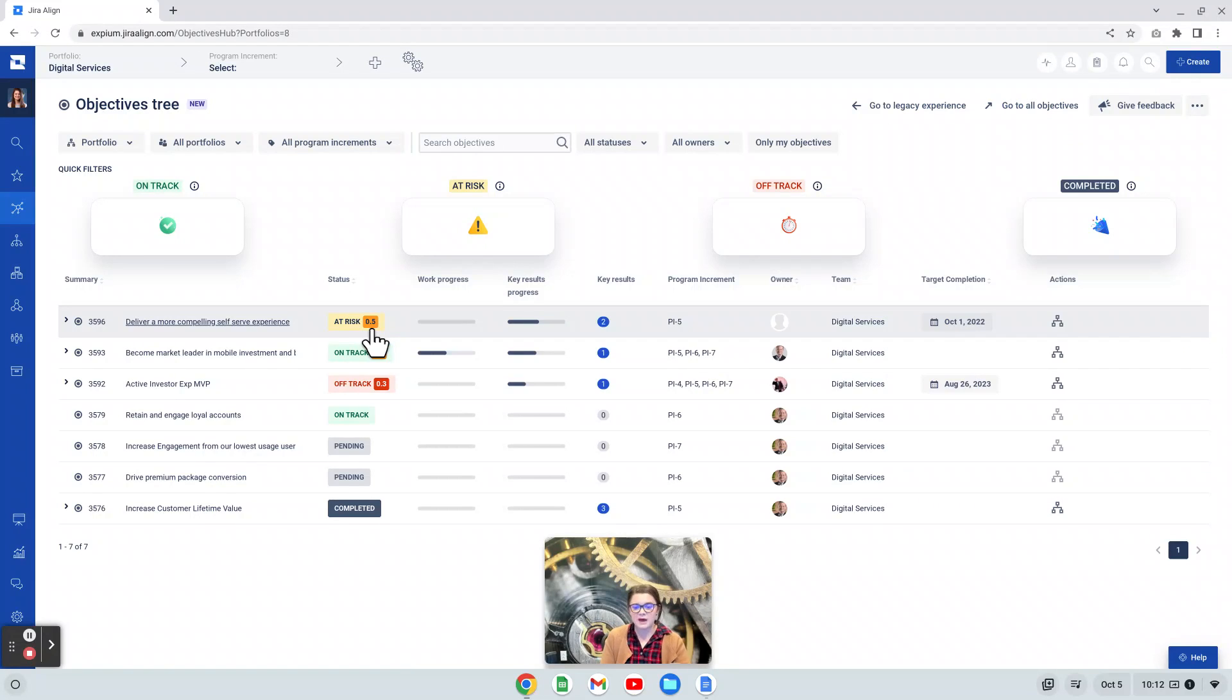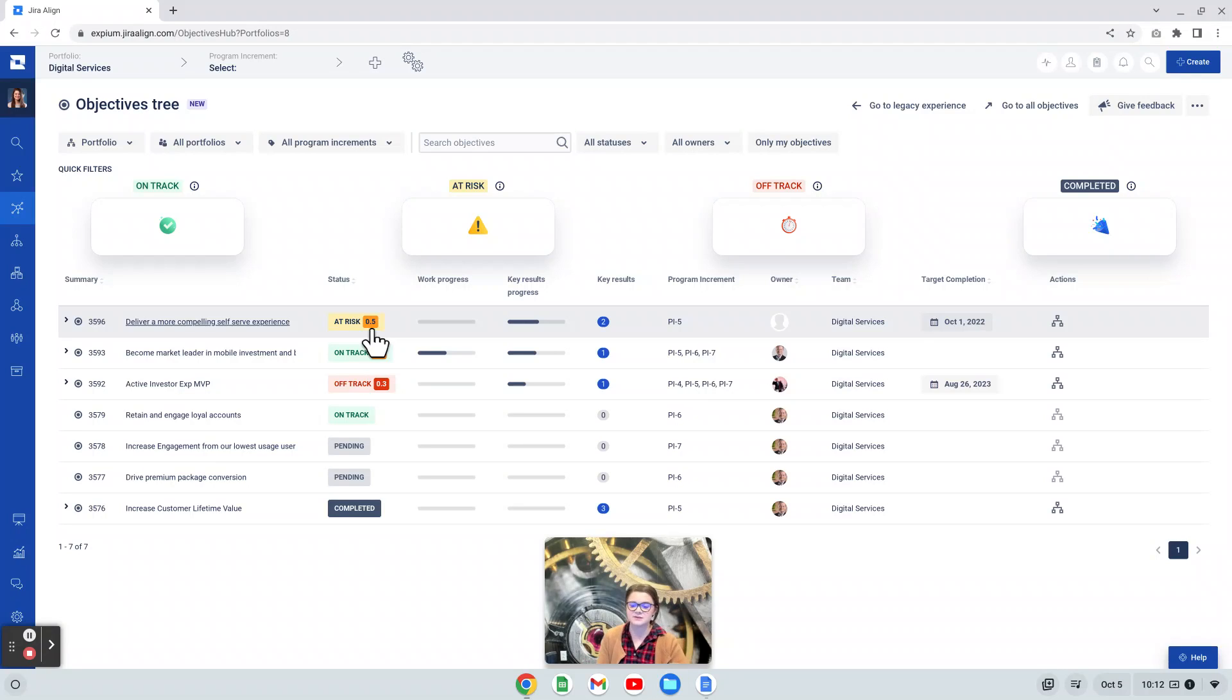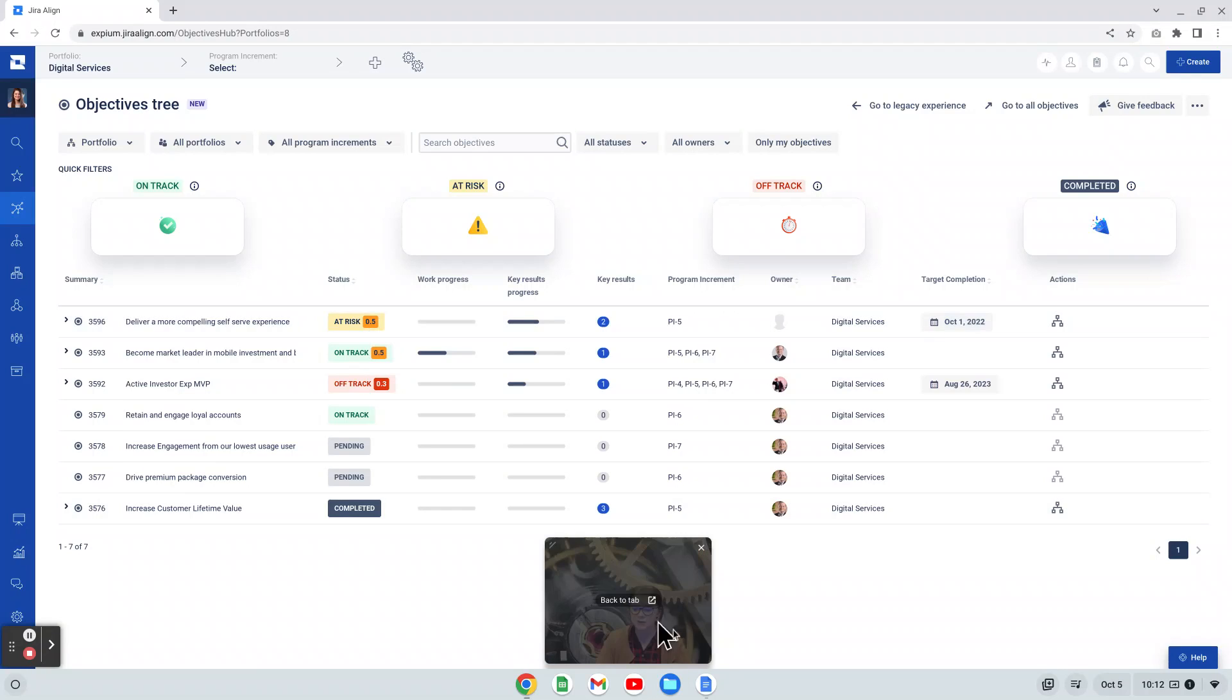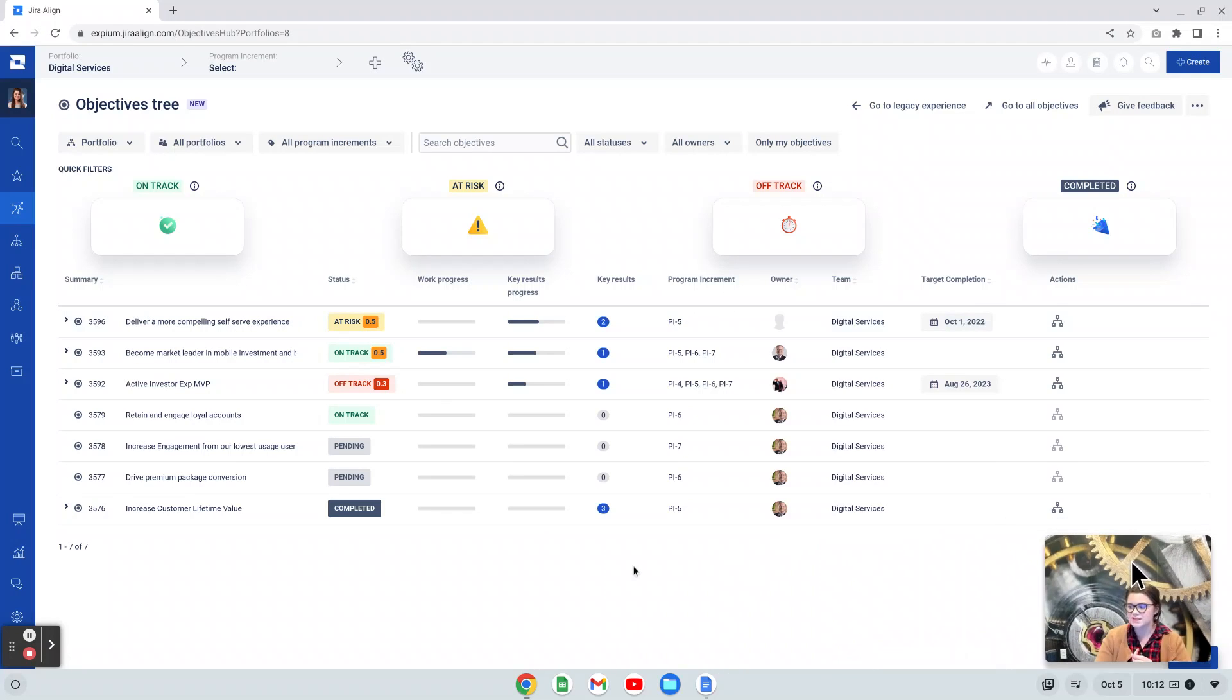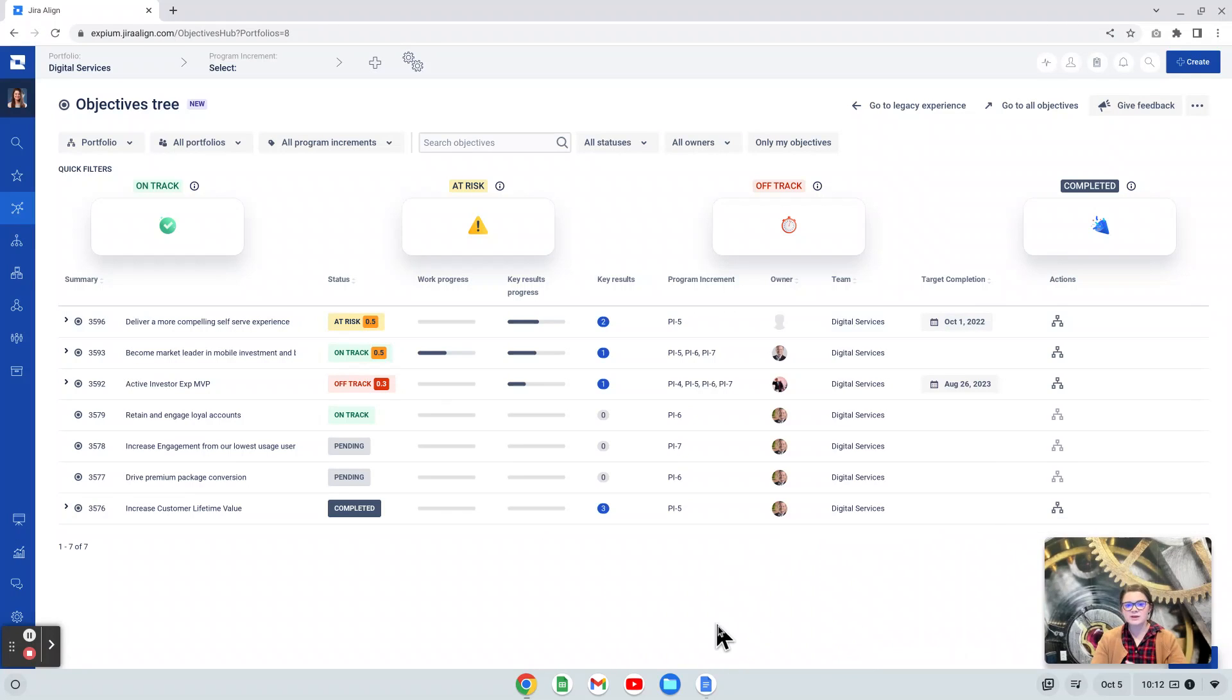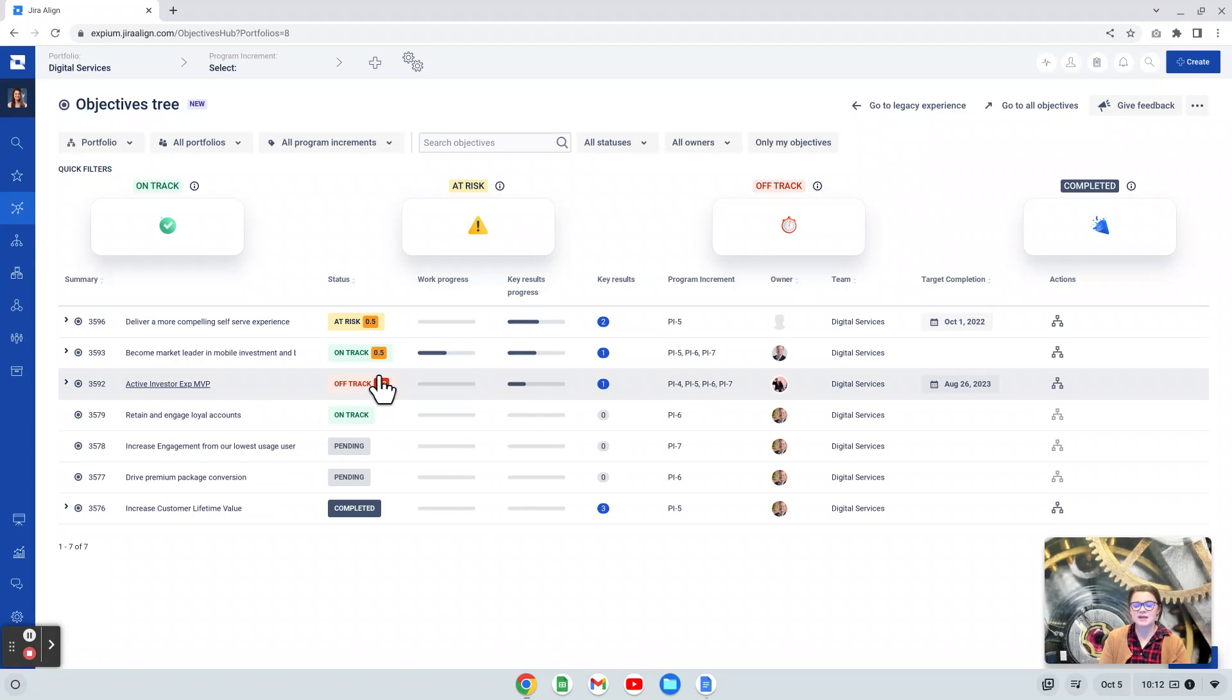Something I want to call out about the status in the key results field. These are manual fields. So as we are checking in, we will update that score. And then we are going to need to manually update that status field. So if you haven't already, I recommend working with your stakeholders and establishing really what value we want to consider at risk, off track, or on track here. This color coding is automatic, but again, we have to manually set that status field.